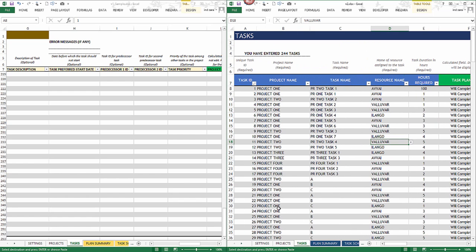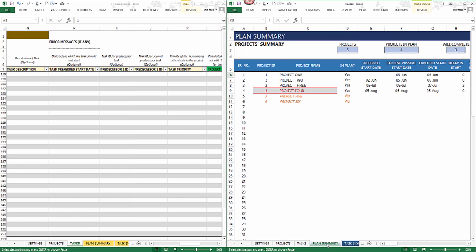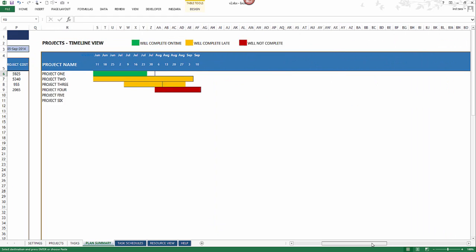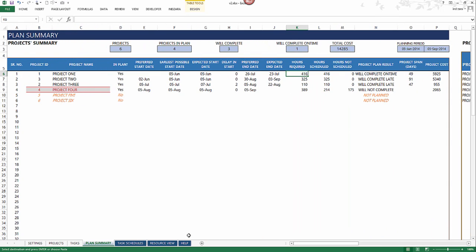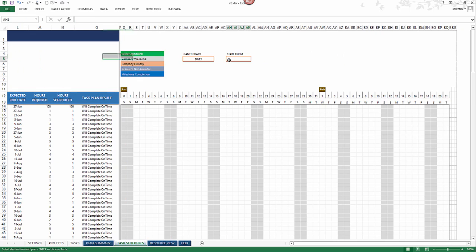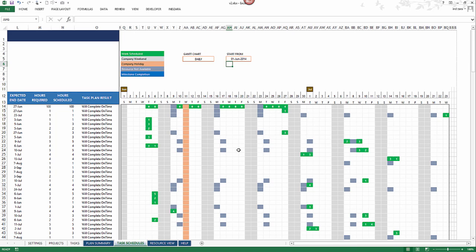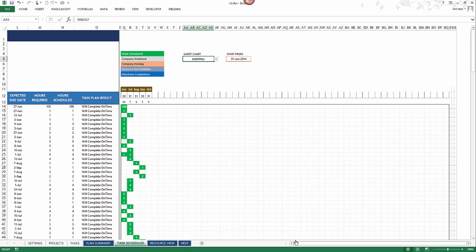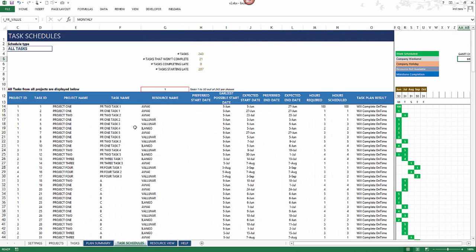We have now migrated all the data from version 1 into version 2 quickly and easily. You'll see the plan summary, an upgraded timeline view, resource summary information, and significantly upgraded task schedules with better labels, updated customizable Gantt chart. Once you enter the right start date, the Gantt chart gets populated. You can also customize the Gantt chart to show monthly, weekly, or daily views — these features were not available in version 1.